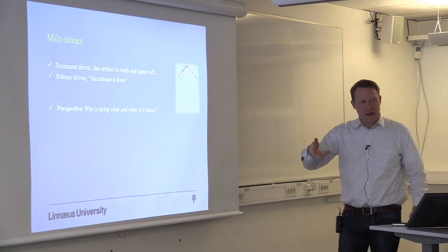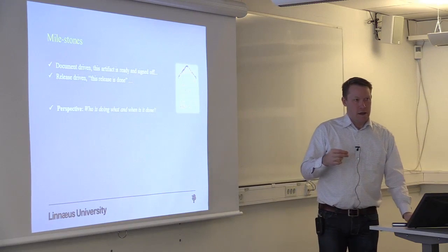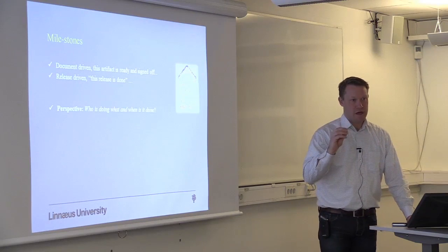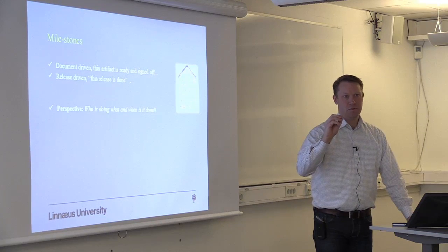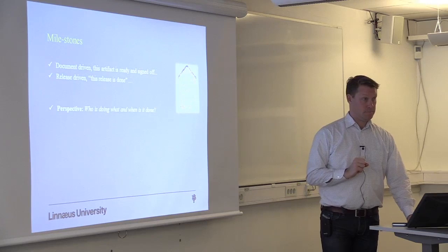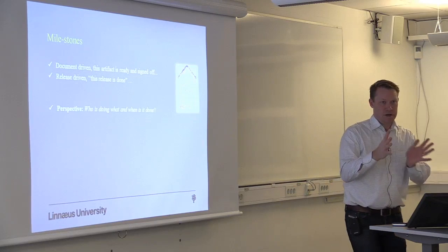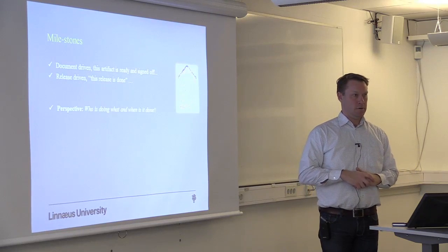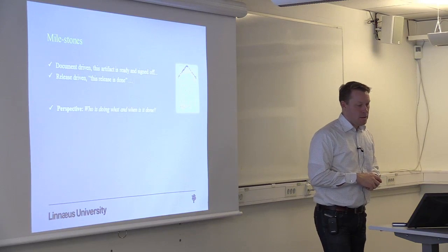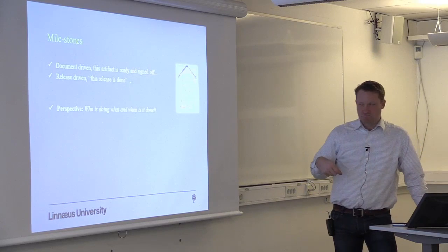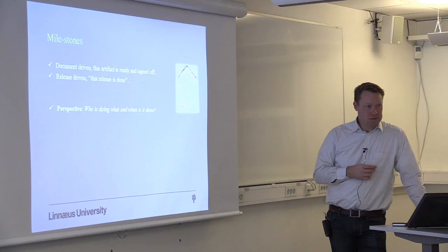But you can also use releases. You can say that, okay, two months from now, we should have a demonstrator of the system, the principal architecture of the system up and running. Then another two months ahead, there should be a feature complete system that we can deploy. However, the perspective here is more: who's doing what and when is it done?